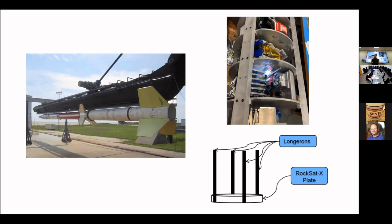So provided we make it past that review, which I'm very proud to announce that Virginia Tech's team has done that this year, we're set to fly 2 experiments that we're going to talk about. Right, we get past that, we spend all the spring working on manufacturing and testing from the subsystem level all the way up through integrated subsystem testing and culminating in a full mission simulation, and then handing it off to